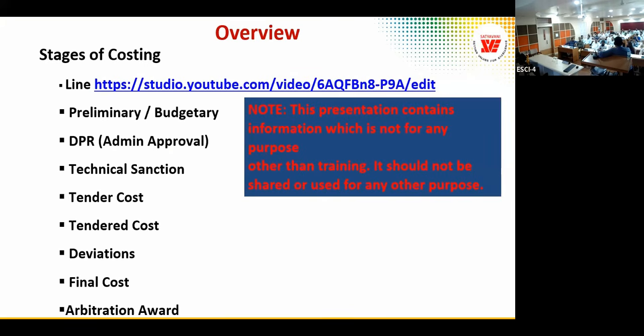In the Government of Maharashtra WRD department, we are doing quality and cost based selection: 70% for technical and experience, 30% for cost. It is working very well. Yeah, 70-30 is correct, sir, because you also have to give value to the cost. It should not be changed. We questioned why you have changed it to 80-20. There is one interview for 10 marks and experience for 20 marks. Oh, technical part.